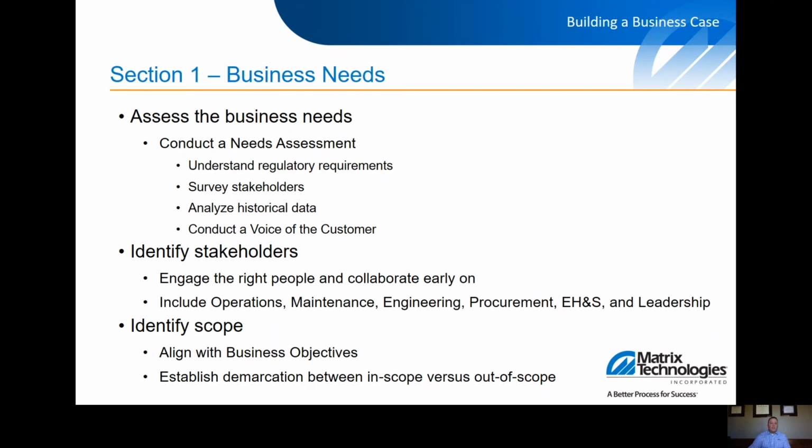Typically, a needs assessment is as simple as determining the needs of the business. This is simply a data collection process that addresses needs versus wants, along with gaps between current process state and desired process future state. To do this, one needs to understand any regulatory requirements, survey key stakeholders, analyze historical data, and consider conducting a voice of the customer.